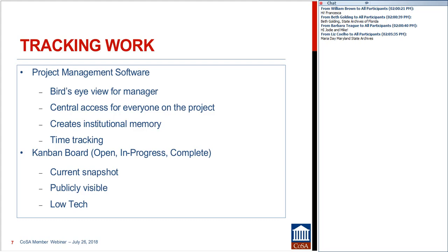If this particular element of a project has been in the in progress column for a month and a half and is not making any forward motion, that's kind of a red flag that we need to address what's happening there and maybe break it down into smaller tasks, those kinds of things. But it's a very low-tech way to keep track of what is happening and where. And so, obviously you could divide that board into individual projects and tasks per project, and just keep moving those Post-it notes from left to right across the board.